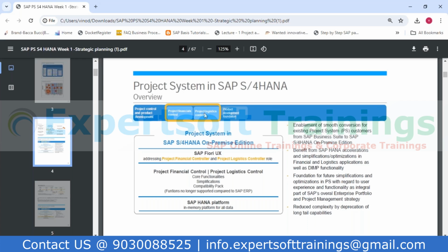In the logistical part, you create BOM materials, assign them, create reservations, and deal with PR, PO, and GR. Also, we create a sales order. We check how the milestones are converted; until you confirm those milestones, sales people cannot raise the bill. We also see how the BOM integrates with PP production planning. Those things come under project logistical control.